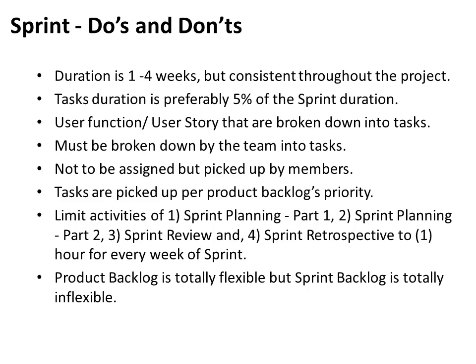Let's do a checklist of do's and don'ts in a sprint. Obviously, one of the key things is that a sprint is not shorter than 1 week and not longer than 4 weeks. The average ones are about 2 weeks long. You've got to remember that if you do a very short sprint like 1 week, there's a lot more time wasted in the sprint planning, review, retro, etc.